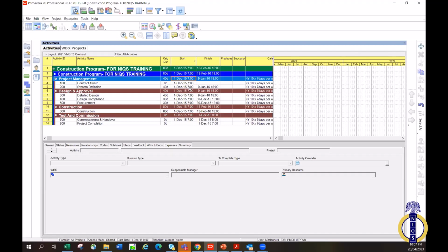The first thing I check is to open your predecessor and successor columns to check for open ends. So when you are reviewing your schedule, doing schedule assurance or audit, those are the things you look out for. I won't overflow it, I've said it enough because it's very important. Your schedule must not have open ends.